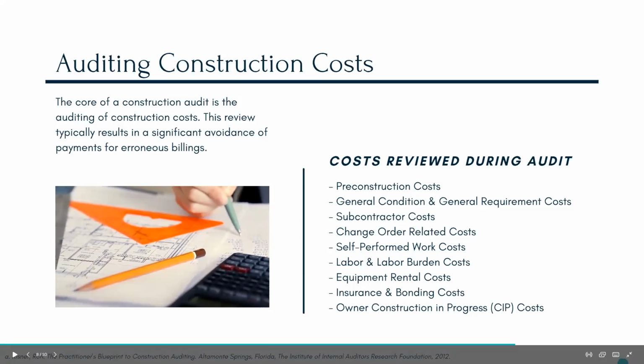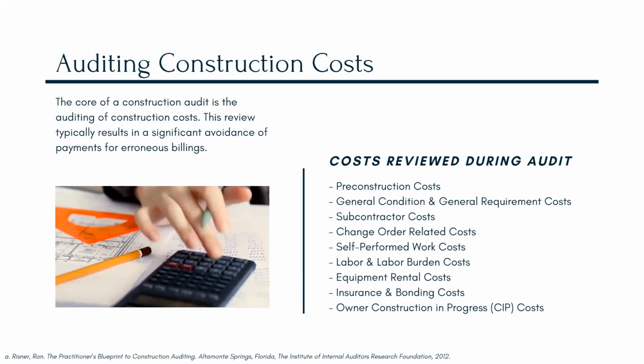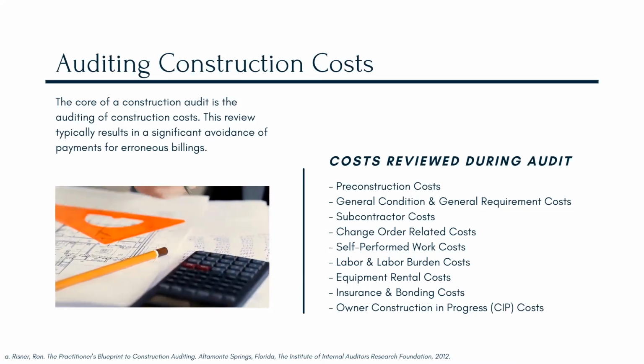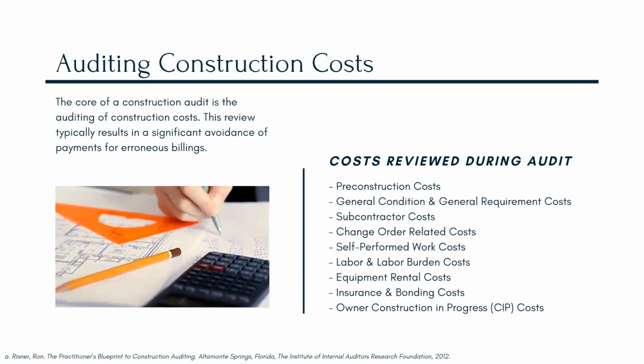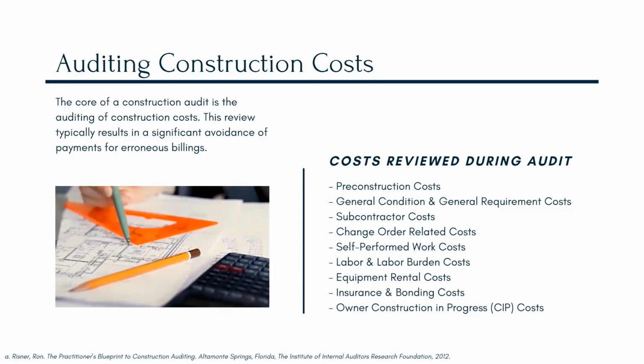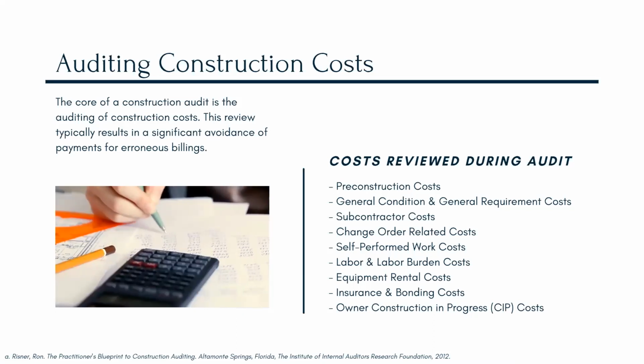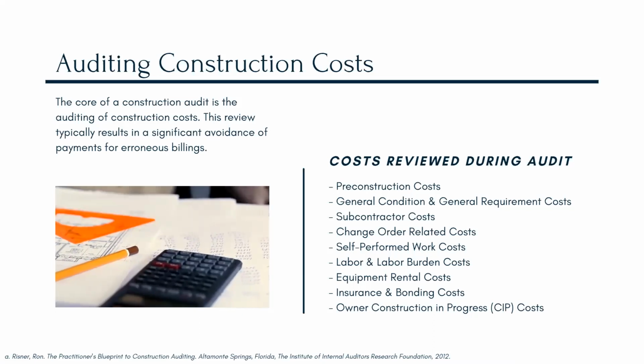What we found is oftentimes labor burden is bid into the contract as a percentage of labor, and getting into those details, the labor burden breakdown, oftentimes leads to some variances between what was being billed as labor burden and the actual cost of labor burden.